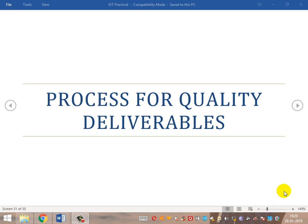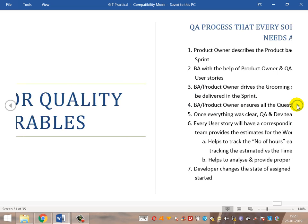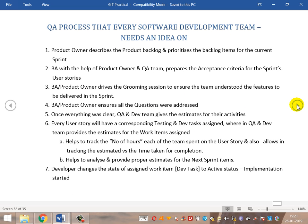So let's see what is the process that needs to be followed for achieving this quality deliverable, from the base of requirements gathering to the end of production deployment. At the early stages of gathering requirements, the product owner takes into play — the product owner gathers information from the client side, support guys, and collects all the information, then describes everything that has to be done into the product backlog. Once the product backlog is ready, they prioritize it based on client requirements — which high-level requirement needs to be delivered first and which next.